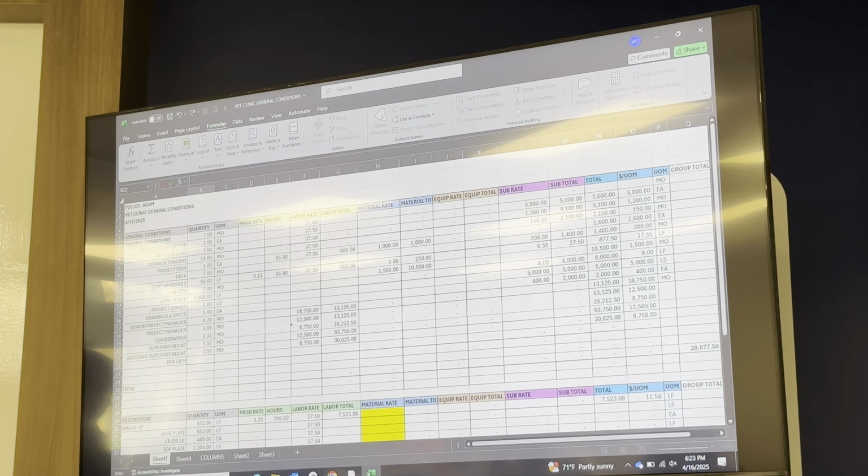So we're gonna add up how many months of per diem we need, so we're just gonna do sum and add up everybody from assistant superintendent to senior PM. That's months. And by the way, per diem is tax-free, so it is just pure money. I need to know how many months of per diem I need to include, so it's just the total of all the months of time that are gonna be charged to the job.